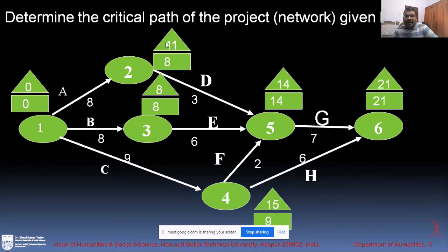And in this one, this becomes very important. In this one, look at 14 minus 6, 8, and 8 minus 8, 0. Here, look at 14 minus 2, you have 12. But since we are supposed to look at the latest completion time of this activity in the reverse case, we take the highest, so we put 15, not 12.